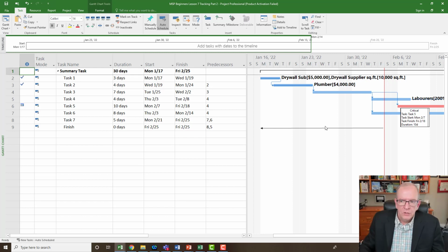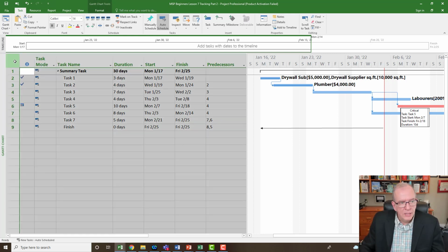All right. So now that I know that information, and that, in this case, it was okay to move that to there and to put a constraint on there because I know it can't start any earlier than that because we're already at this date. So what I'm going to do is click here. In this case, that's why I don't mind having a constraint there. And then I'm just going to go up here to this mark on track, which is really a cool tool. If you get into the updating process, I want all of these to be updated.